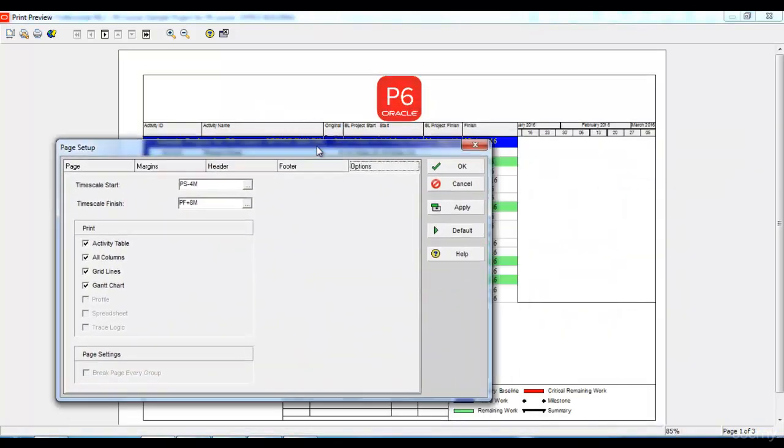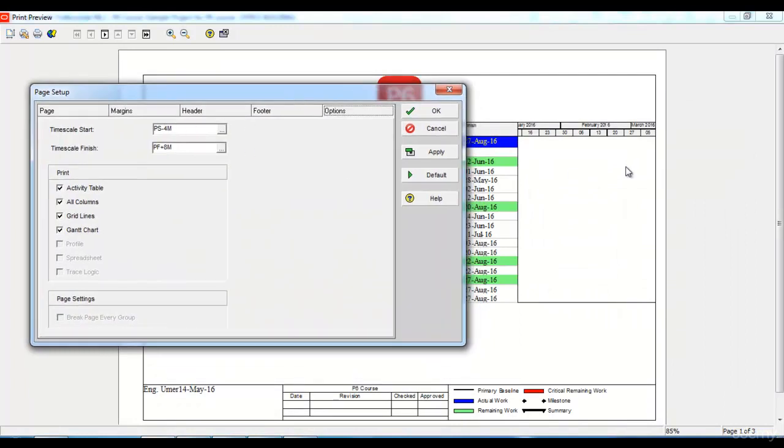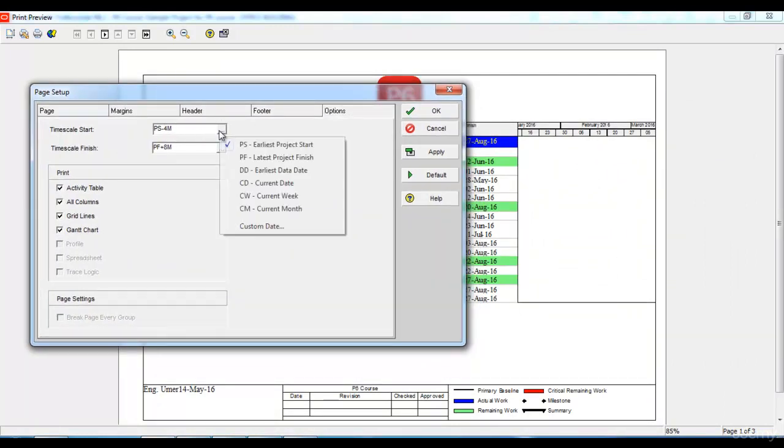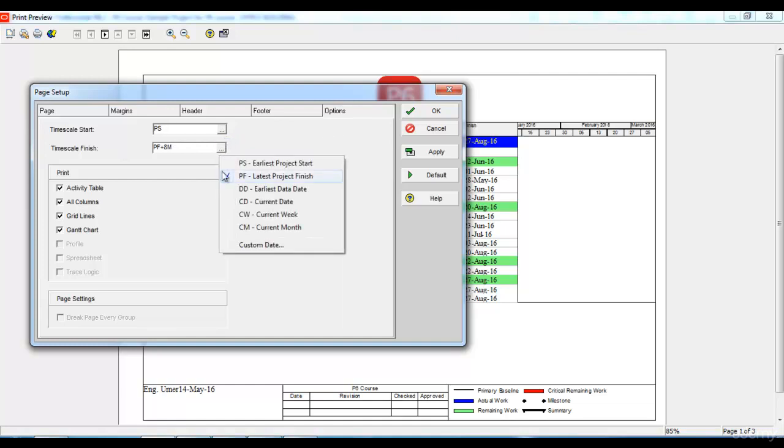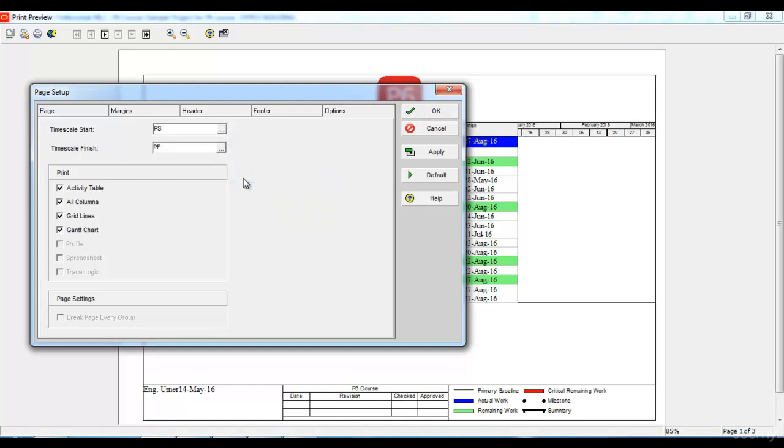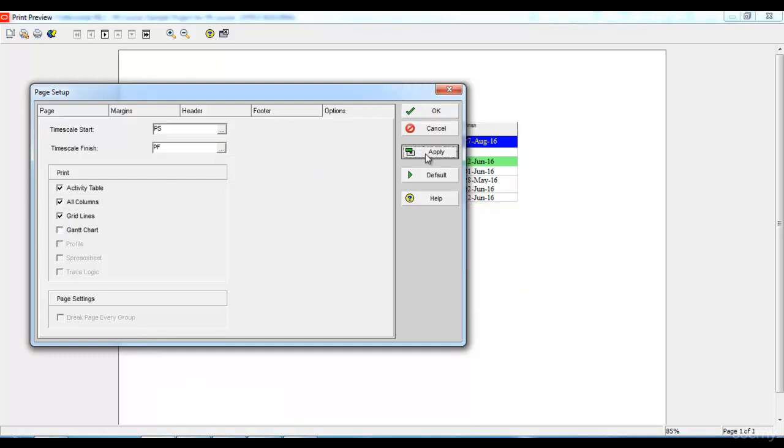Under options, we can select the time scale of the Gantt chart that we want to show here. I can select the start of the time scale. Let's say I want to start from project start up to project finish and I want to print activity table. If I want to print an activity table without Gantt chart, I can click here and click apply.